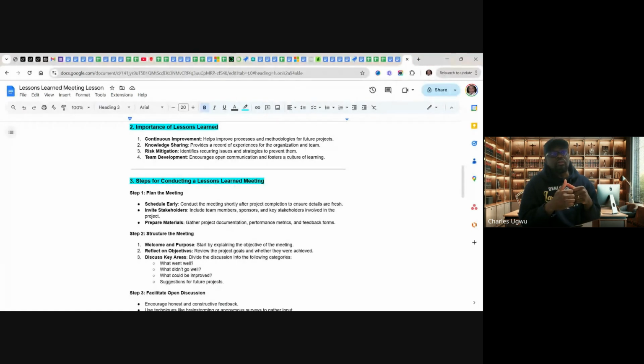If you do it after the project closes, maybe some contract workers who are not working permanently with the organization must have left because the project is closed. You know, if I'm working on contract, the project comes to an end, my contract ends, I'll just leave. I'll be looking for another job. So if you try to do it after the project, you might miss some input from key members who just left.